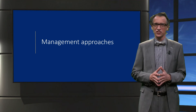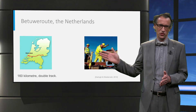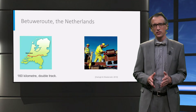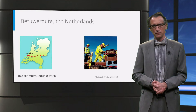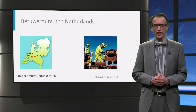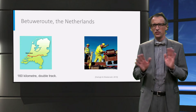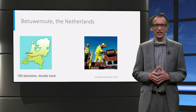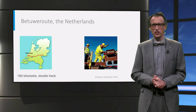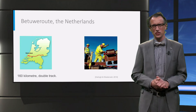Let us first start with an example. The example is of the Betu route, a rail freight line in the Netherlands that was delivered in 2007. In the 90s the railway line was planned and there was great opposition against the line. People didn't understand the need for this and said, not in my backyard. One of these problems was that the project was planned without sufficient interaction with stakeholders.